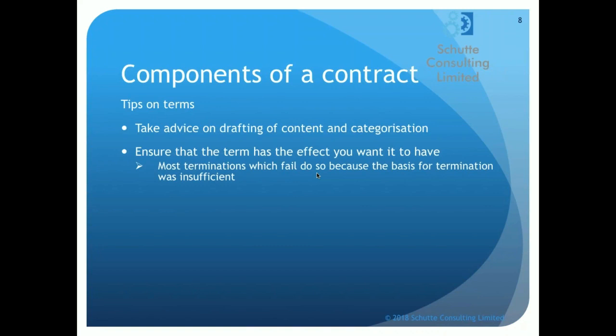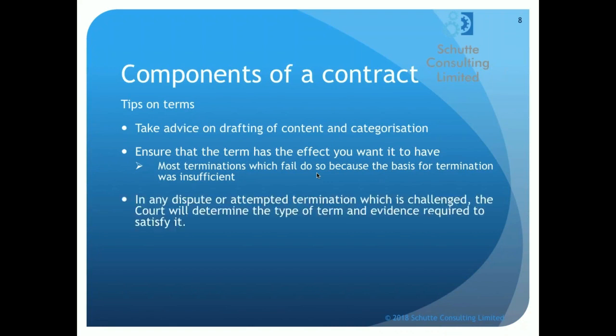Statistically, and I've had a couple of these in my time, most terminations which fail, in other words, an alleged termination or an attempted termination which has been challenged and gone to court, and the court has said, no, this is not a proper termination, the reason for that statistically is because the basis for the attempted termination was insufficient. In other words, they got the category and the content of the clause wrong.